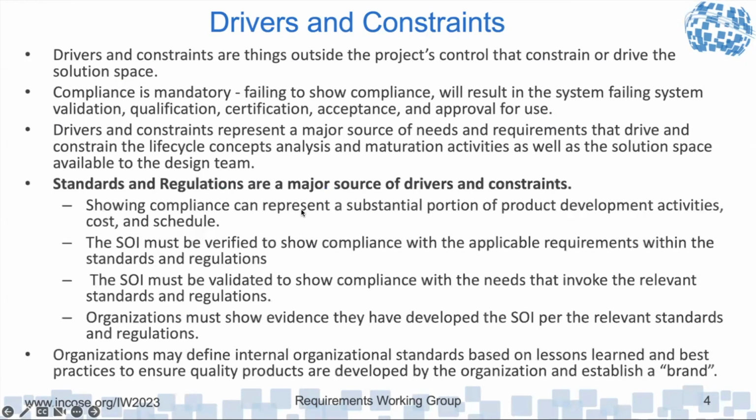The thing about standards and regulations is that they are a major source of driver's constraints, and they can show a substantial portion of product development activities, cost and schedule. And so it's very important because of this that we spend time up front on standards and regulations and figuring out how we're going to show compliance with it, how we're going to document the evidence that does show that, how we're going to present that information. Because it's not just a matter of saying we're going to be compliant.